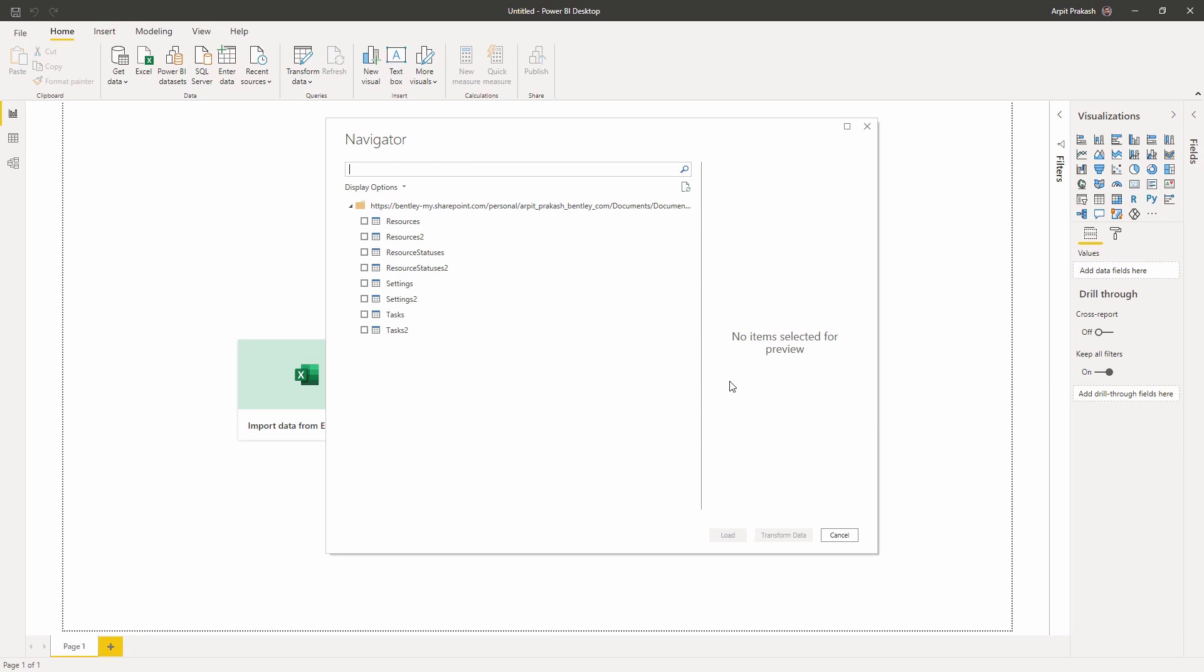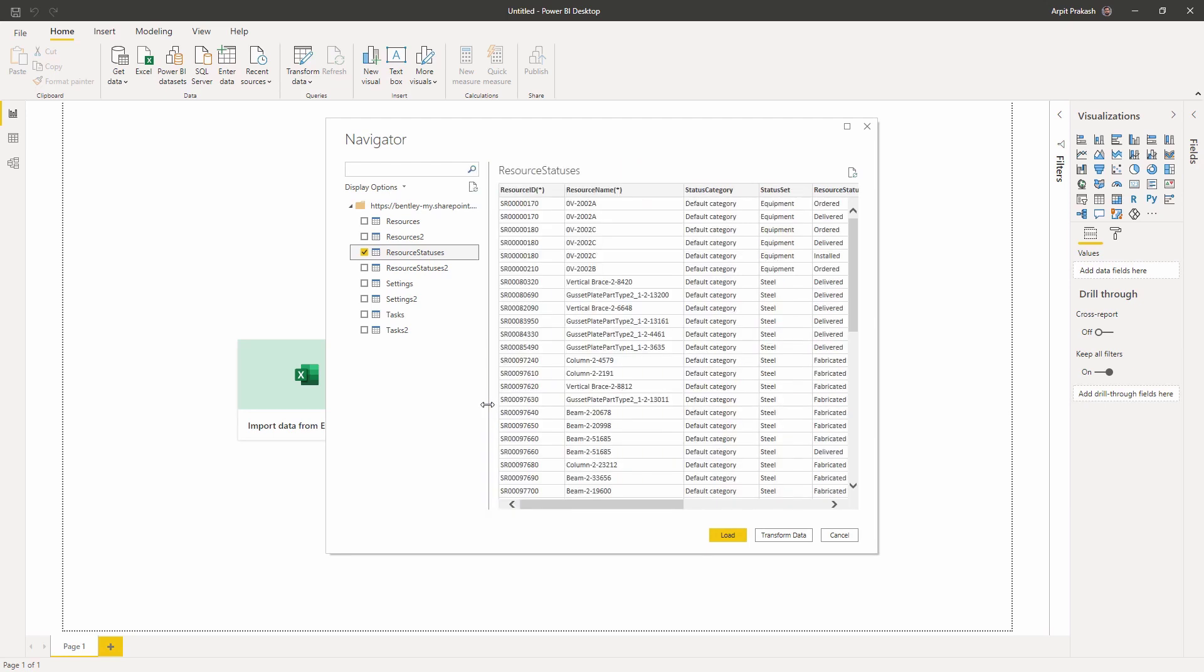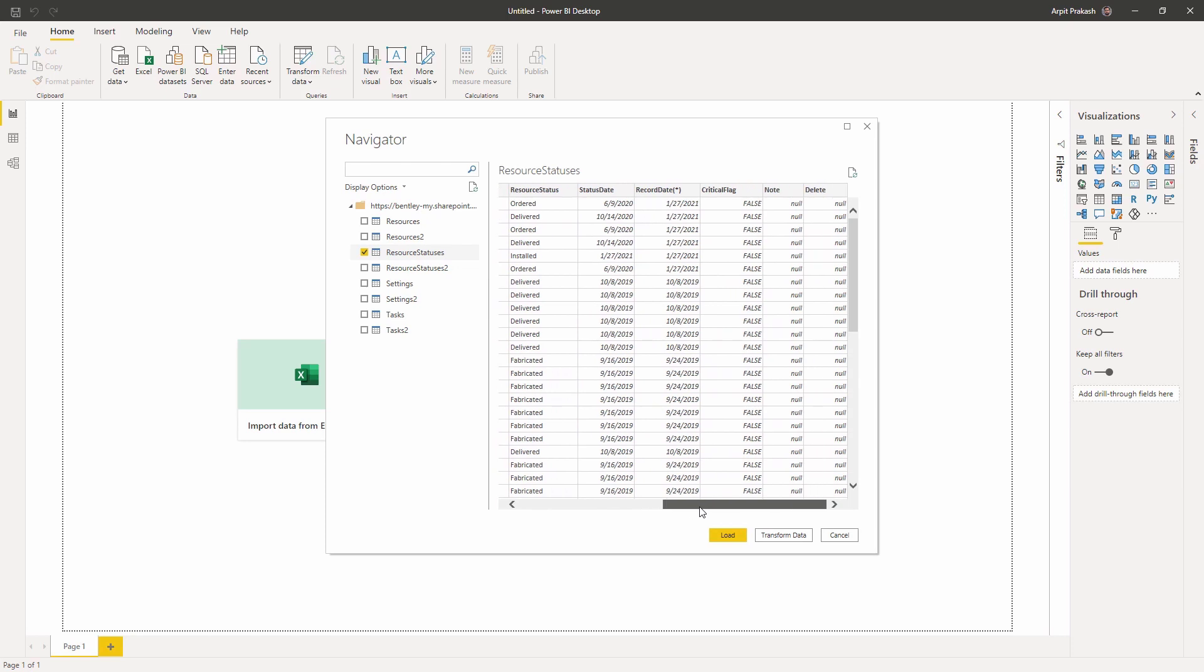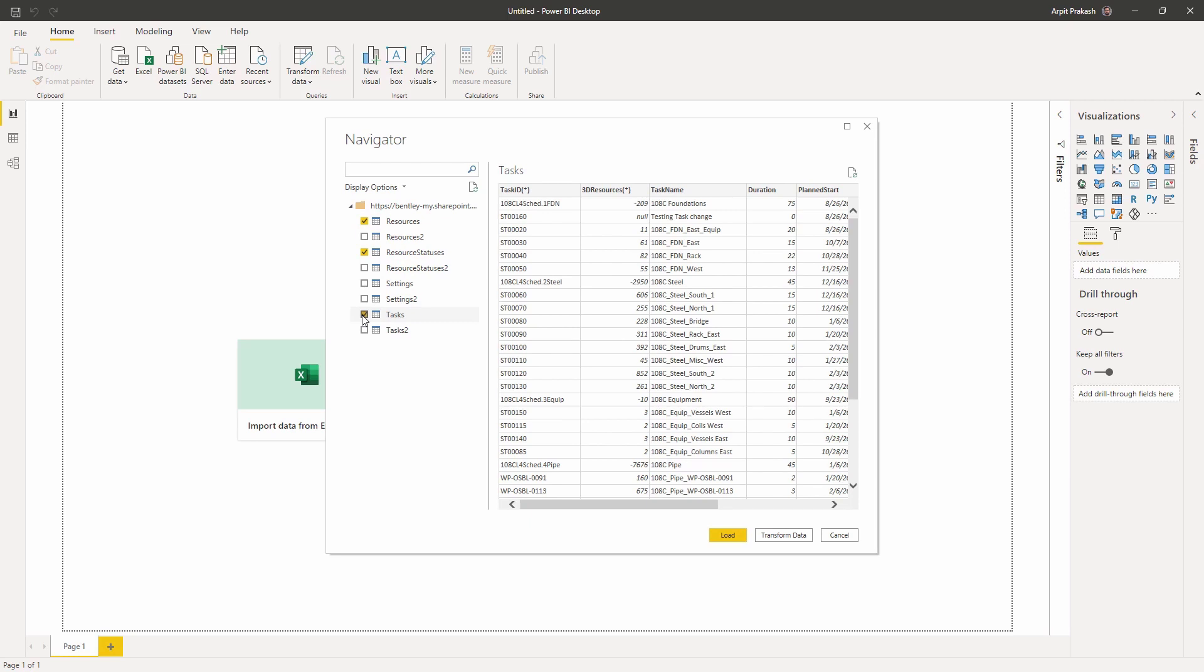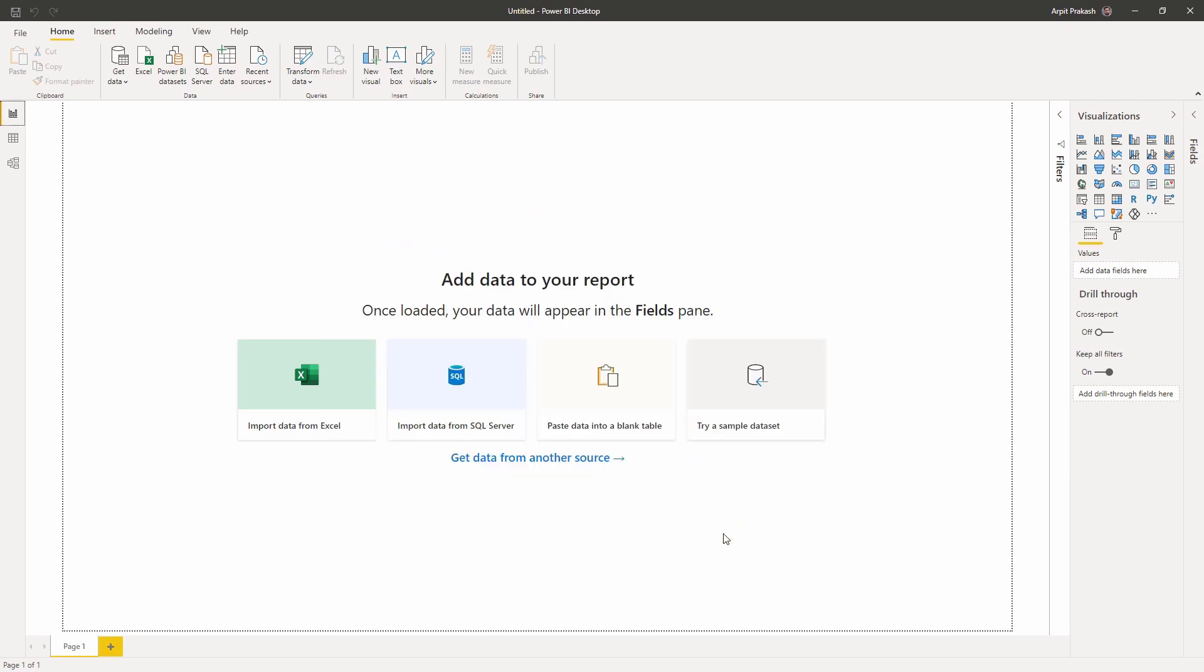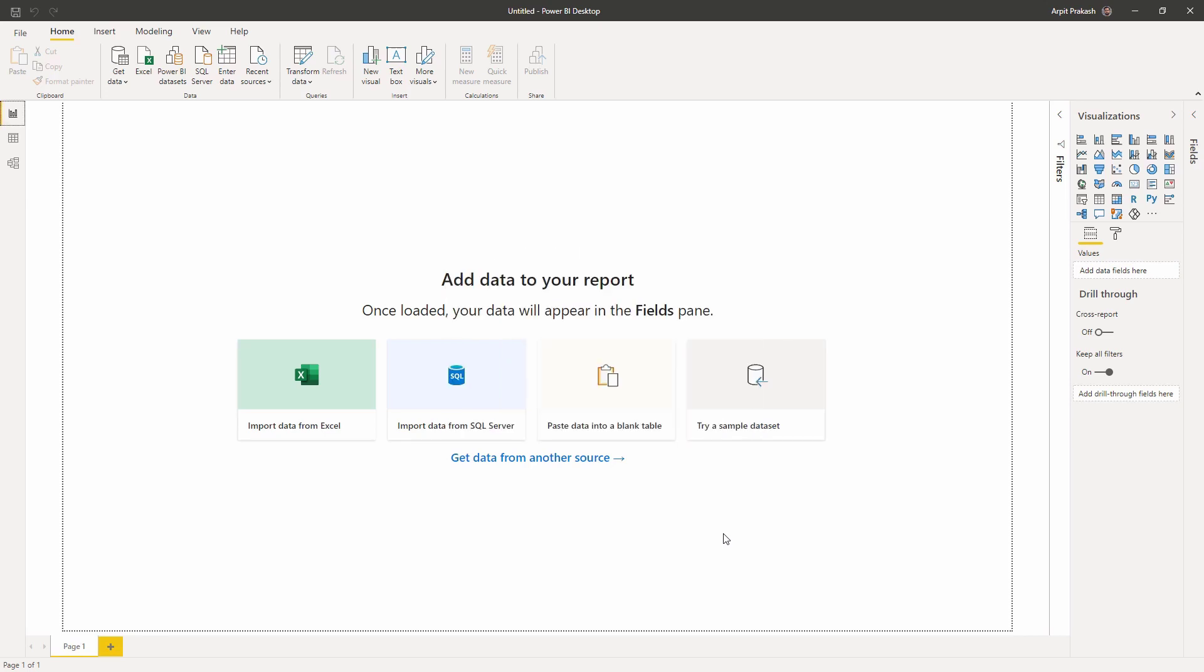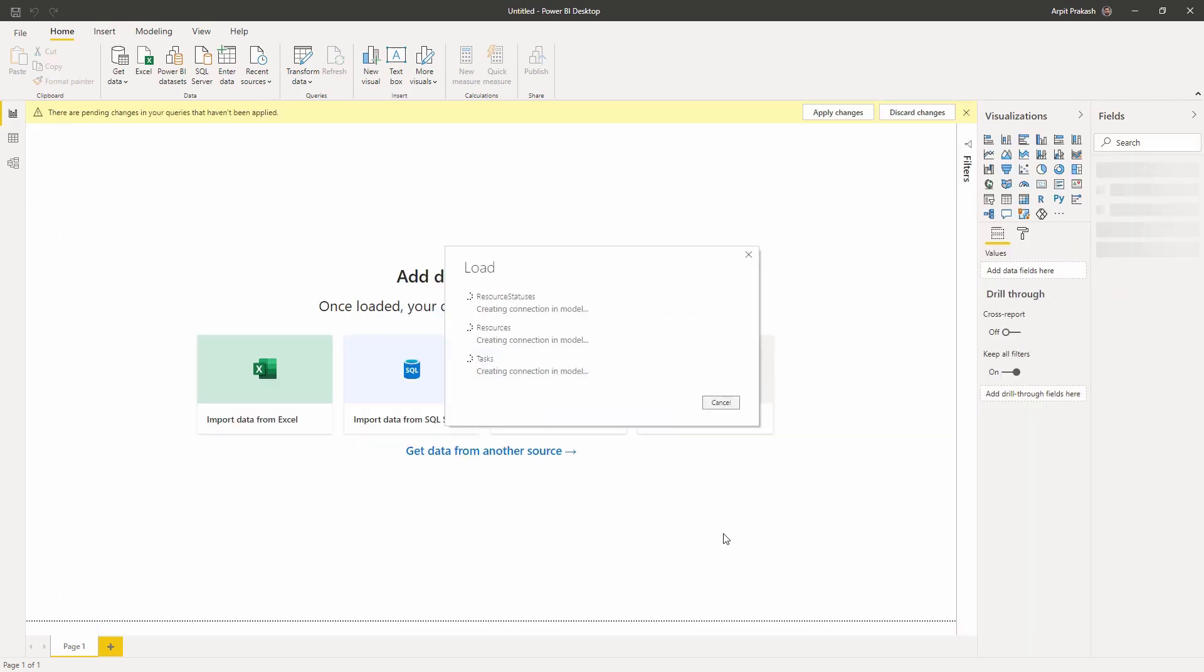If your connection is successful, you will see all the sheets and a preview of the data from the Excel spreadsheet here. Now the reason I'm using a web connector instead of Excel is that when you re-export any updated data from Synchro 4D and override the Excel spreadsheet, the published Power BI report and dashboard will automatically update and thus presenting you with the latest and greatest data.